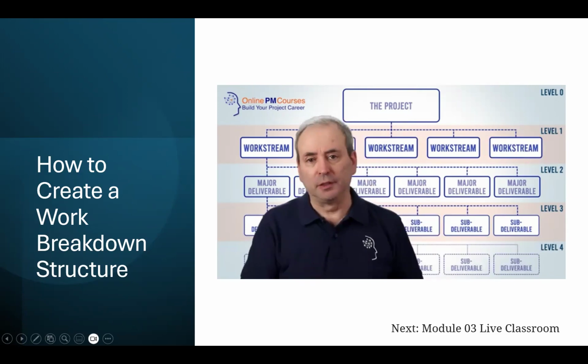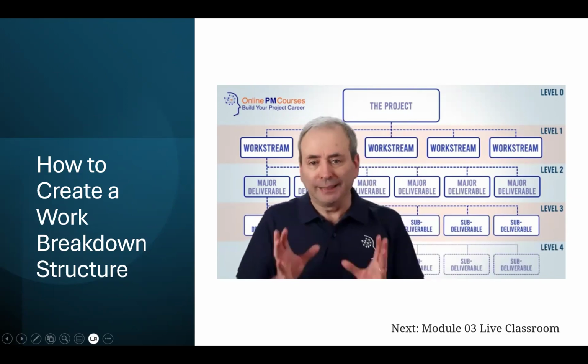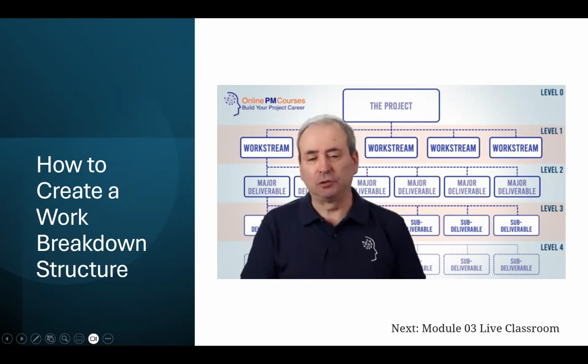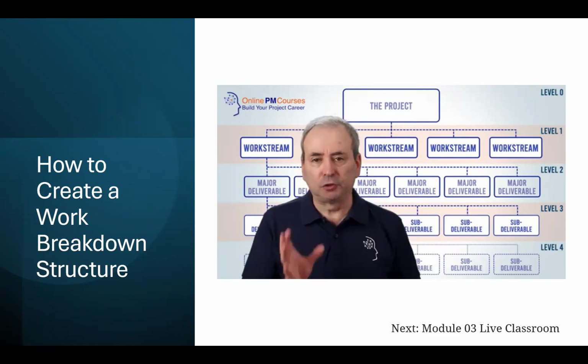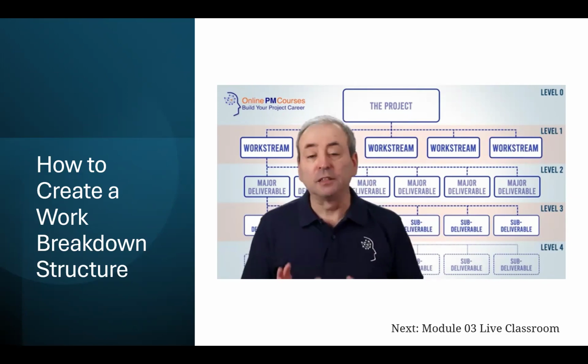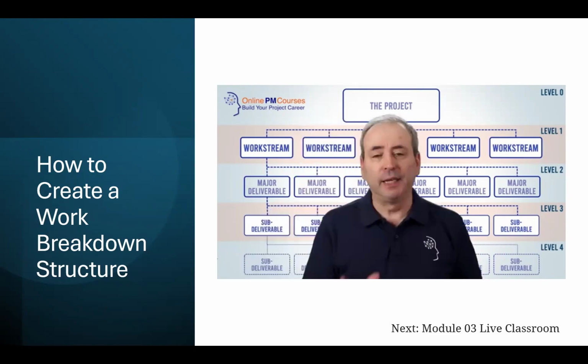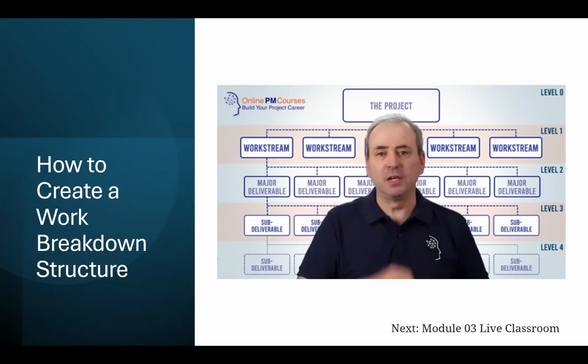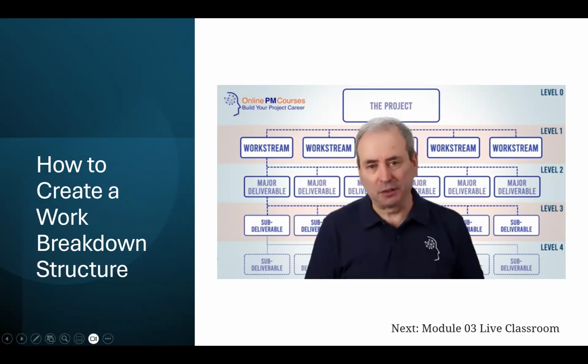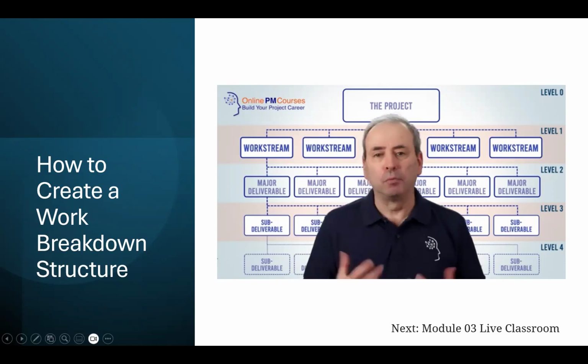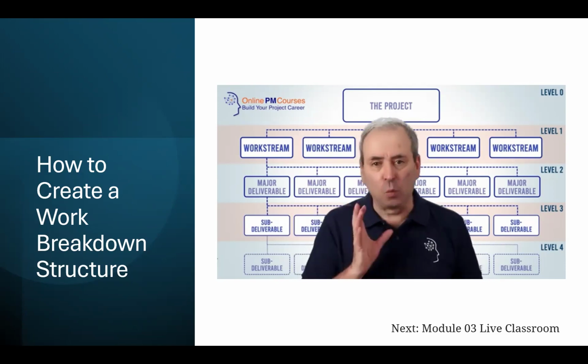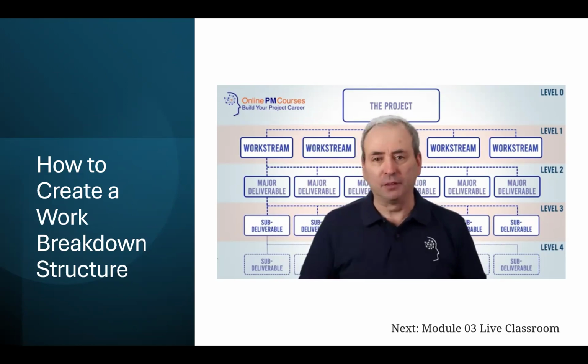Level 4, and maybe levels below this, further decompose the sub-deliverables and the interim deliverables into smaller and smaller deliverables to the point where each deliverable is a unique and fully constrained thing in itself. Make sure that these are structured into logical hierarchies and, as far as possible, sequenced in a logical order. And of course, it may not look tidy, but it is okay to go to different depths, different numbers of levels at different parts of the work breakdown structure, because your work breakdown structure should be determined by the work that needs to be done, not by some platonic ideal of a perfect, neat work breakdown structure.